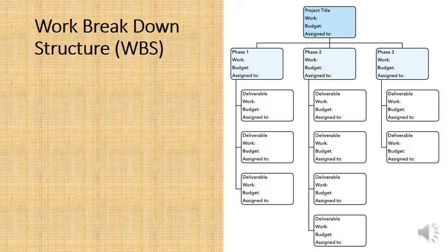And so with each work package, as a bare minimum, you should have a good description of what that work package is trying to achieve. What is the goal of that work package? And also, you need to be able to, even at a preliminary stage, assign a budget for it, how much money can be spent on that portion of the work package, and also a schedule, how much time can be spent on that work package.